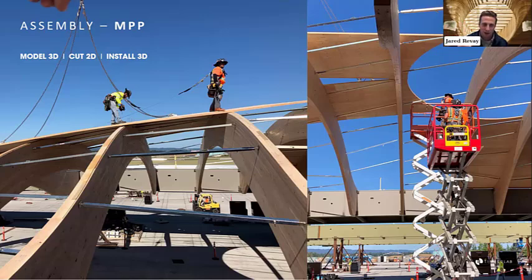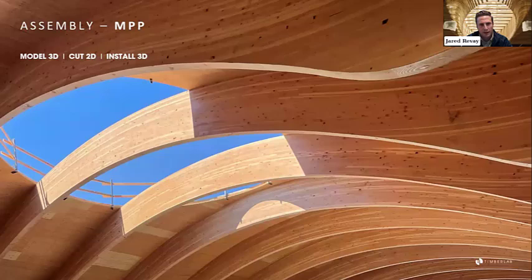But not only just going out there and doing that, but thinking about where you start and how you progress through that fastening, so as it starts to adhere to that shape, it doesn't grow or shrink into the wrong direction. It fits precisely into that spot where it's supposed to fit. So there was a lot of planning and intentional thinking that went in around the installation and the sequence of how it got installed with each screw. And this is that circle that I so love on the project that came out perfect. We were all pretty worried about it at first, and this really proved the testament of DFMA process and prefabrication altogether.